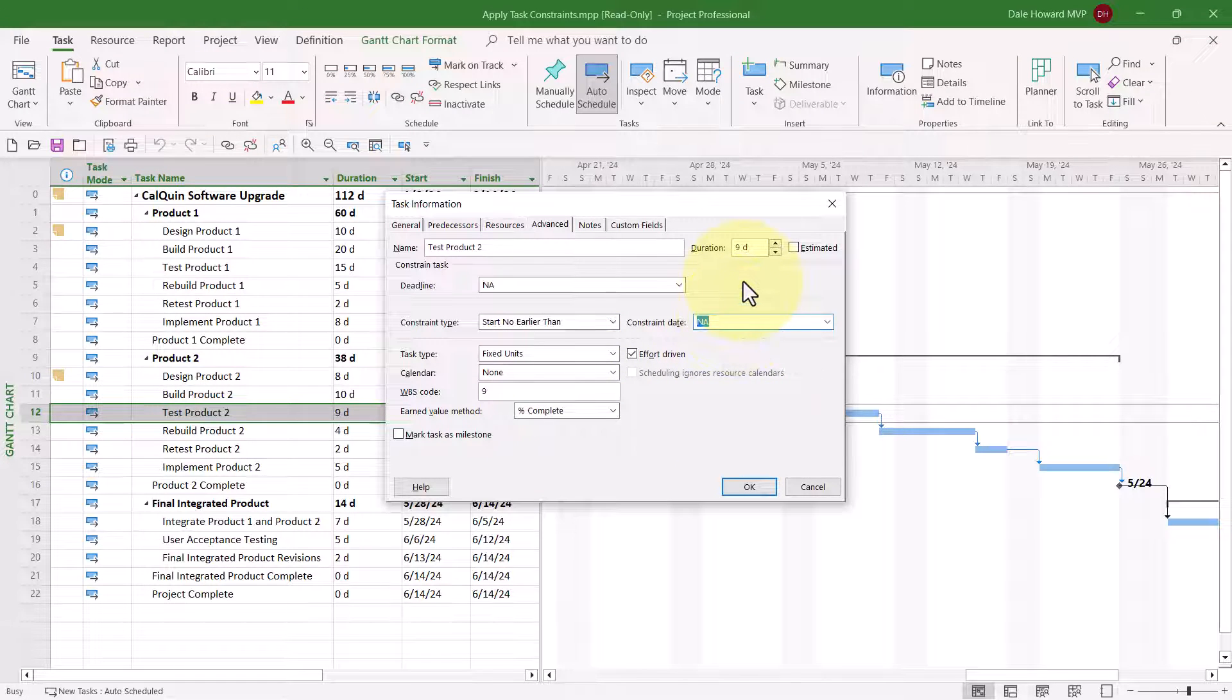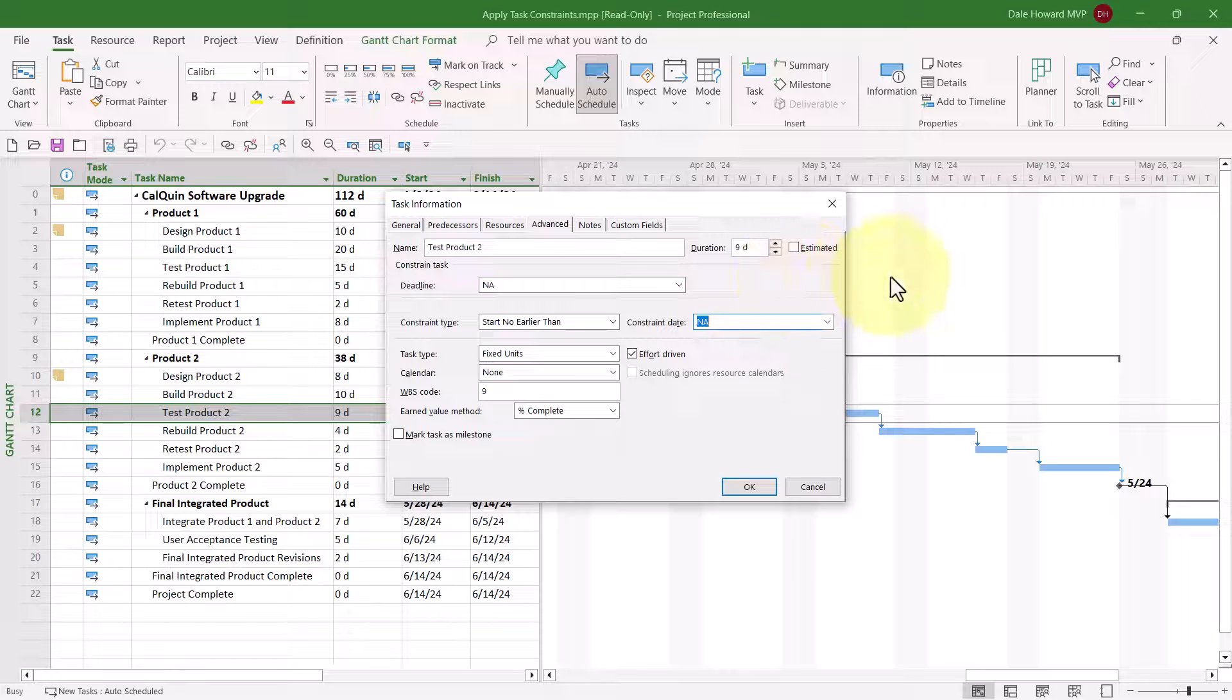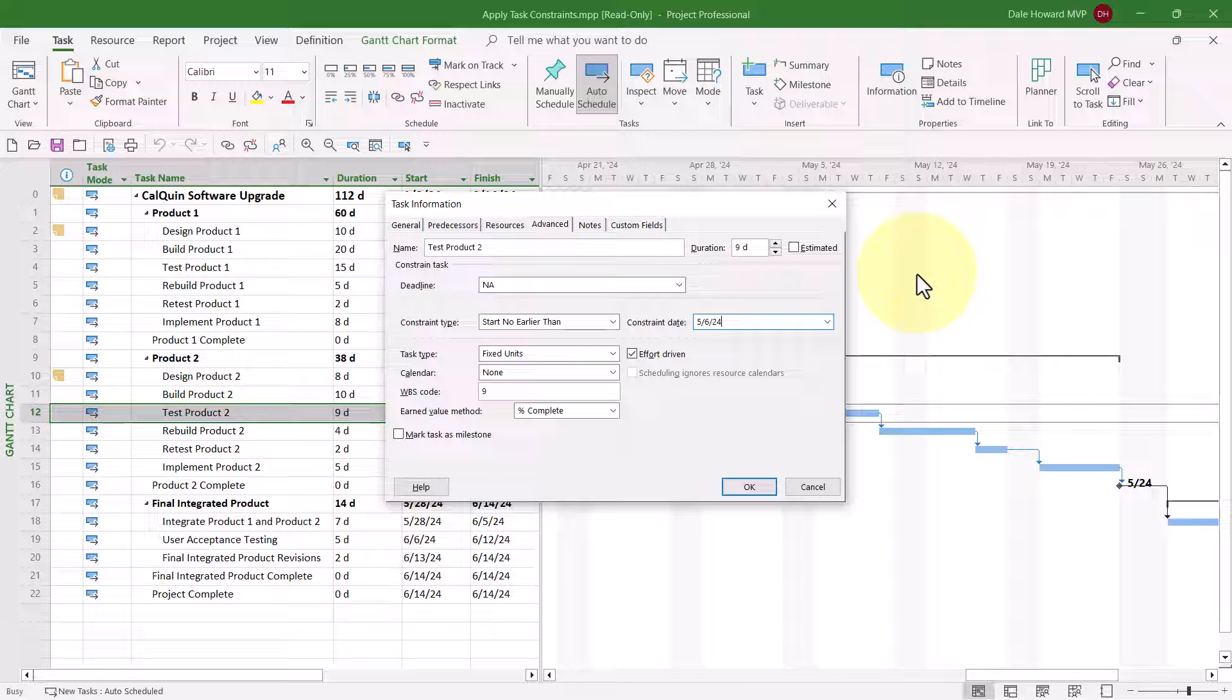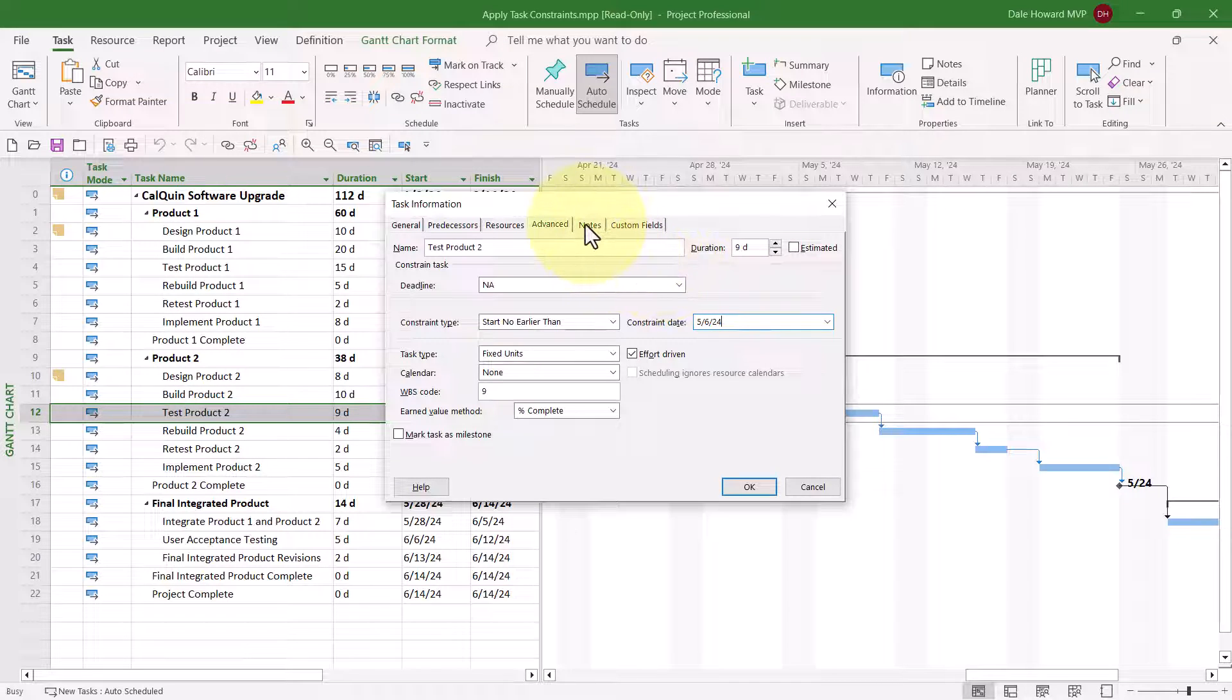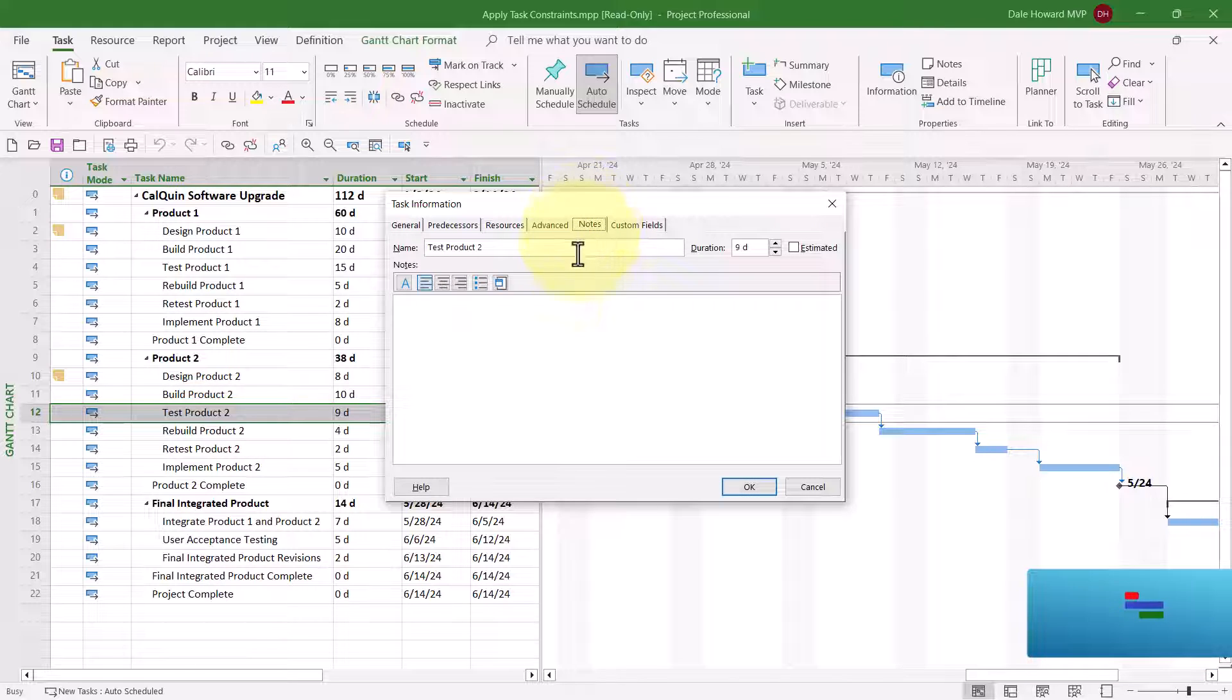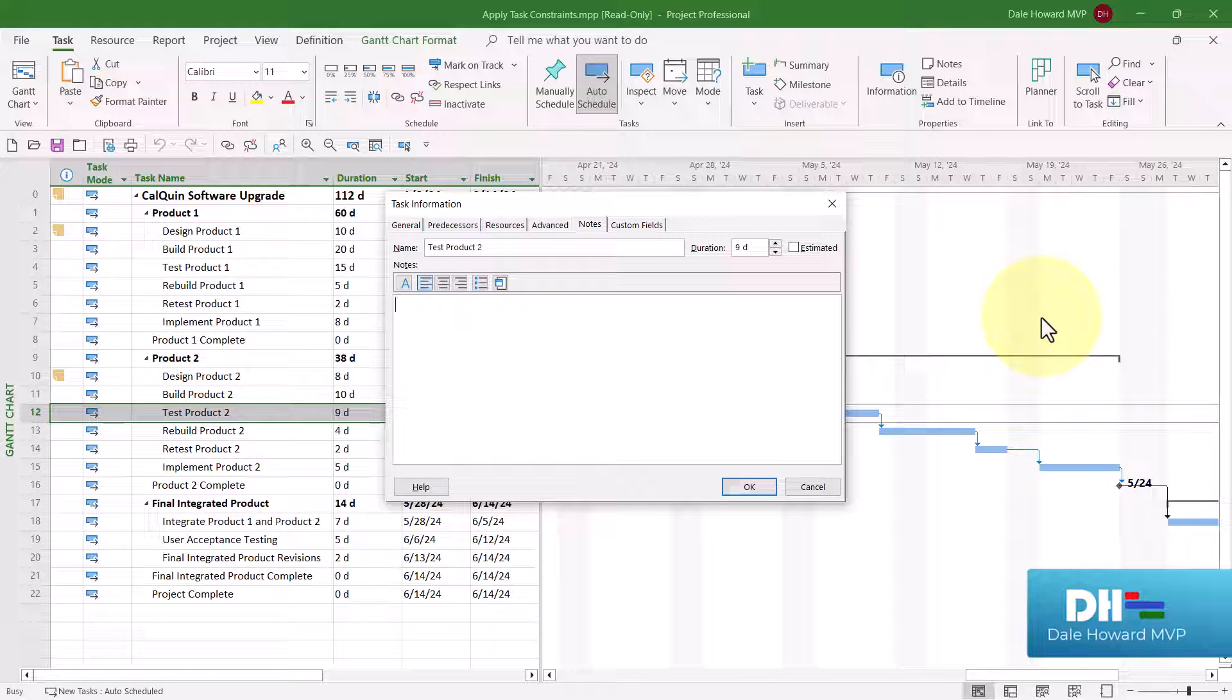Then go to the Constraint Date field and select or enter the date on which you want to set the constraint. In my case, that'll be May the 6th, 2024. In addition to these two steps, I also recommend you click the Notes tab, and then enter a note to explain why you set the constraint.